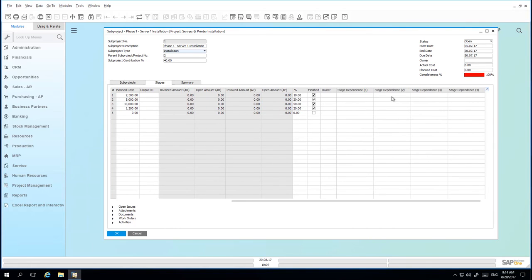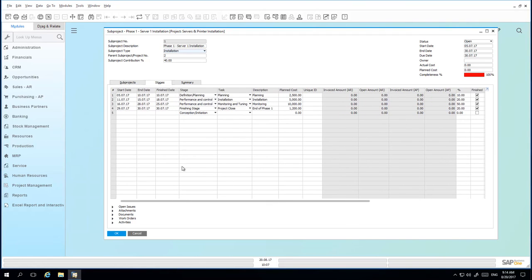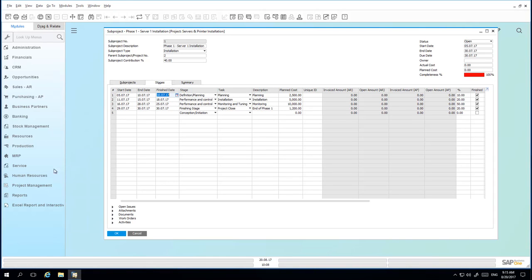You can actually define multiple stage dependencies. We also have the ability to define a finish date to indicate when the stage was actually completed, which can then be compared to the planned completion date. One of Jason's employees, James Chan, has just spent the day scoping equipment requirements on-site at Parameter Technology and Jason would like to create a timesheet for this employee to record the billable hours.